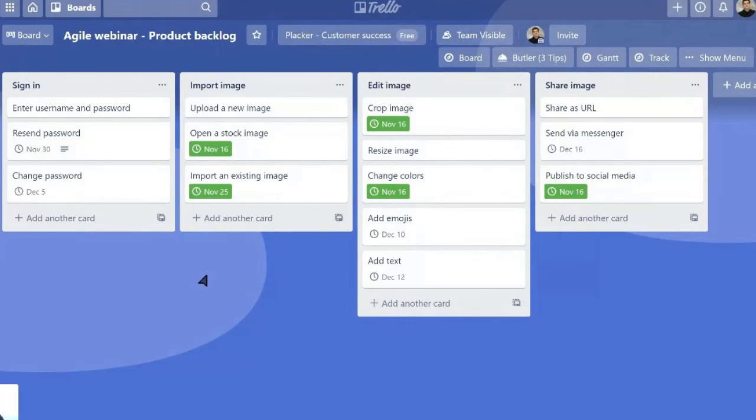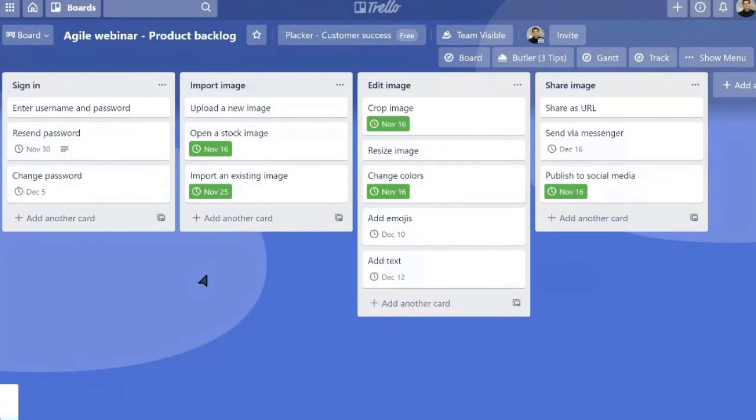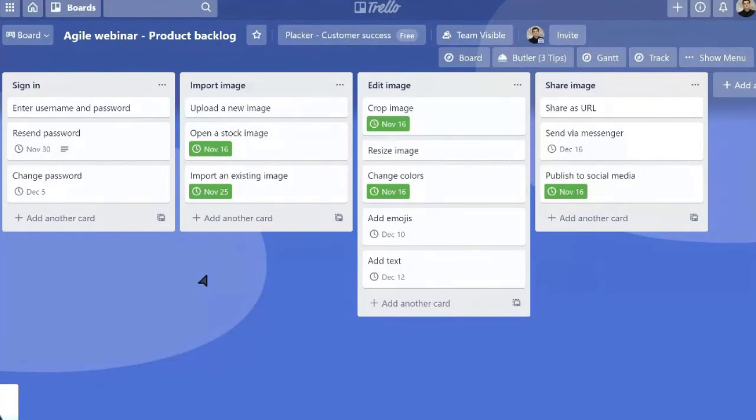What exactly is an iteration? It's a time box, so you select a range of dates. Usually, if we're talking about Scrum, it's something around two to four weeks, where we're going to select a part of this work to be selected to work in each sprint. In Scrum, we call this sprints.